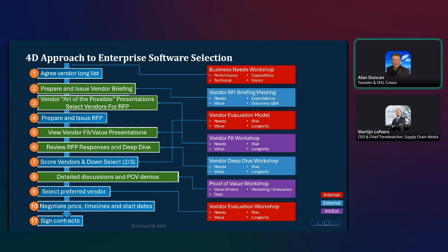So in the past, I've been on the receiving end of this, where I've handed vendors my data that drove my business case and said, there's the raw data. And they've come back and said, we've modeled your data through our system, and we believe we can do this to your inventory level. And they tell you what benefit they can deliver to your business. Now, you can't do this for the whole business.